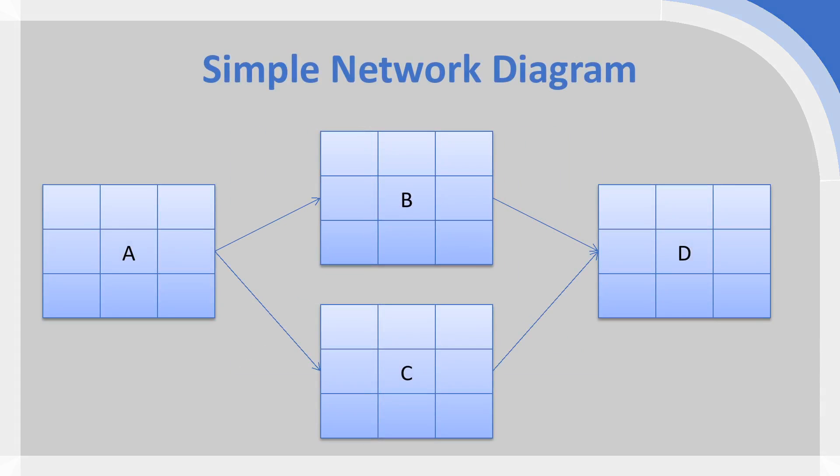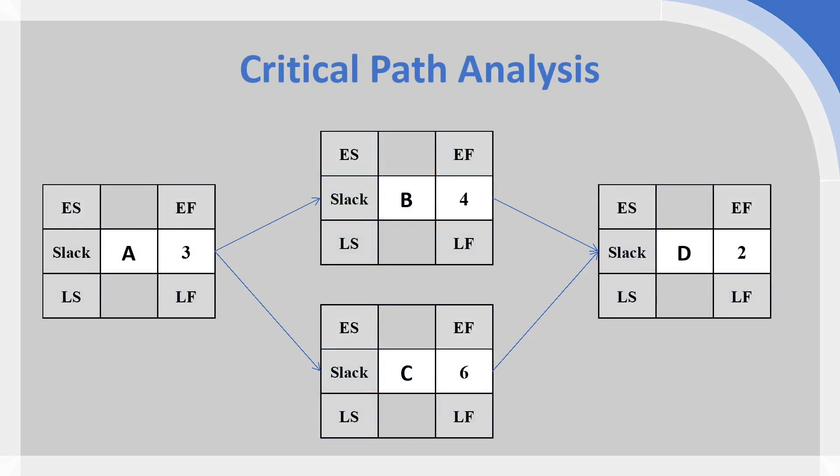Looking at our simple example, we have four activities laid out in sequence, with activities B and C able to run in parallel. From our activity list we can put the estimated duration in the middle-right square of each node: activity A is three days, activity B is four days, activity C is six days, and activity D is two days. Those are the two things we can fill in at the start of critical path analysis: the activity code and the estimated duration.